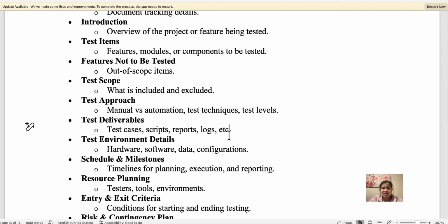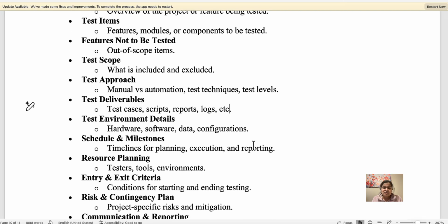If someone says that's a known bug, then we need to include that in the document saying these are known bugs and we are doing the release with these known bugs, and we have to get a sign off, because as QA you are responsible for the end-to-end quality, and nothing should go as a surprise to someone.